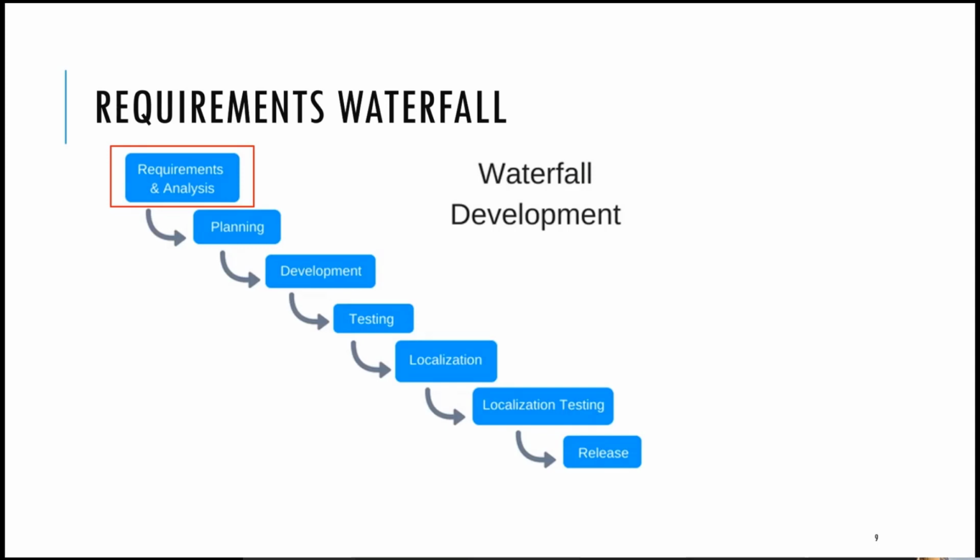All the projects I worked on were either waterfall or an Agile framework, mostly Scrum. And there's a tiny difference in where requirements engineering is located. So just for a quick overview, here is a picture of the waterfall framework. As you can see, the requirements and analysis block is the first one. All other steps can't be done when the requirements aren't clear.